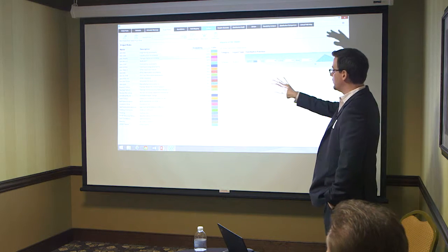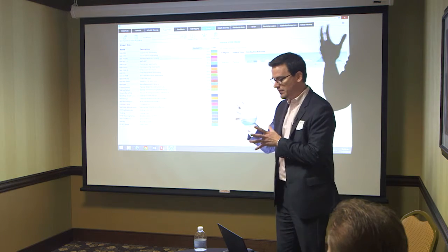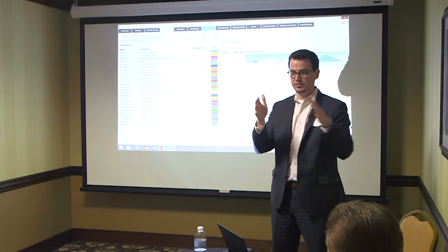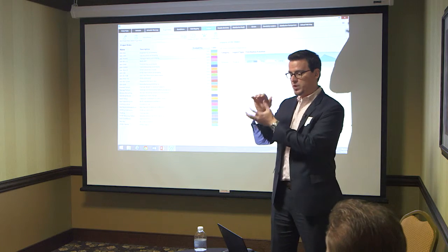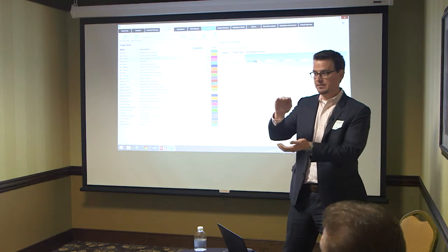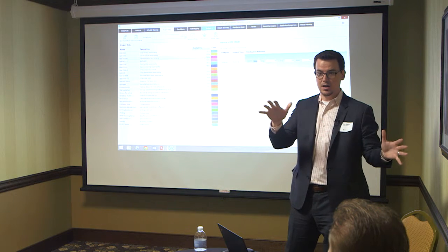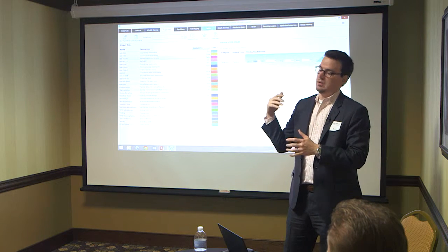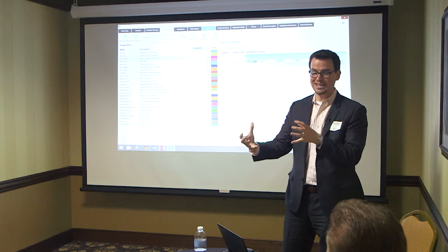One thing to point out here is when I model the uncertainty, behind the scenes I create a risk factor, 100% probability with some range on the side. By default, we correlate all the impacts of that. So I take that one risk and I apply it against 5 activities. It'll impact all 5 of those activities the same. This helps us later when you get into applying it, and maybe you don't have the luxury of building a whole new summary schedule. You've got to deal with the schedule you've been given.